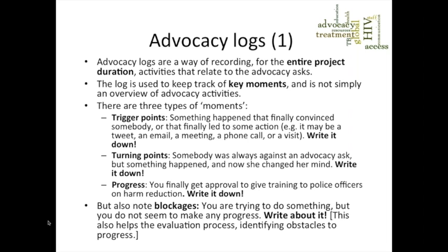The second thing could be turning points, where somebody really changes their idea, somebody who's really anti something you are advocating for suddenly turns right around and says, okay, well, maybe you're right, maybe we should do this, what can we do? You write it down. Or any progress. For example, this is an example I've given here from a project. You finally get approval to give training to police officers on harm reduction. Write it down. Now, it might sound obvious, yeah, write it down, whatever.